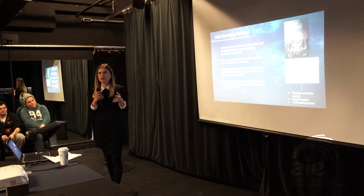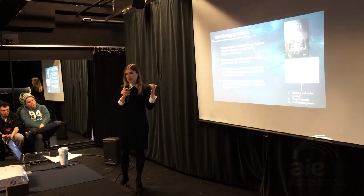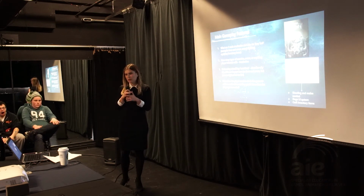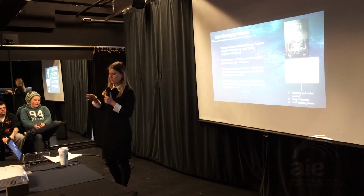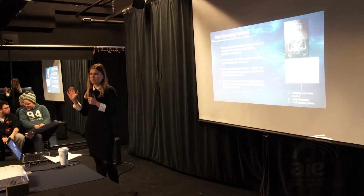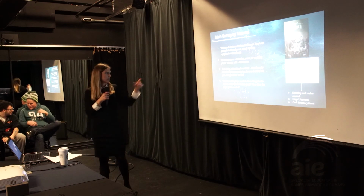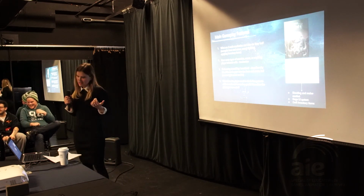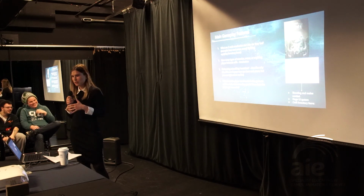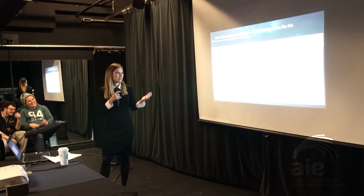And that's also part of the vision when you're thinking about what the game is about, what's the gameplay. But very early, you need to itemize how many of which units you have in the game, how many characters, how many enemies, how many locations. You put it in a simple table, and then it's clear for everybody what the scope of work is. Itemization is very important, and we have tons of tables like this. I mean, not tons, for one game it's like 10.